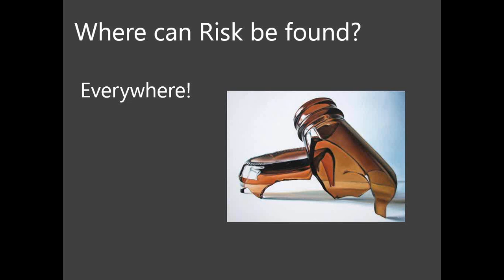Well, we start using what we call suitable control measures. Often the best control measures will start with the words "do not," like do not use a glass bottle. That would eliminate the risk altogether of a glass bottle breaking. However, there are times when "do not" is not applicable. All fieldwork risks can be eliminated by the phrase "do not do fieldwork," but that's not very practical in our world. So then we aim to reduce the risk. We ensure the bottle is packed in a box with enough packing material around it to prevent it from breaking. We may wear protective gloves when handling the bottle so that the risk of cutting yourself is greatly reduced.